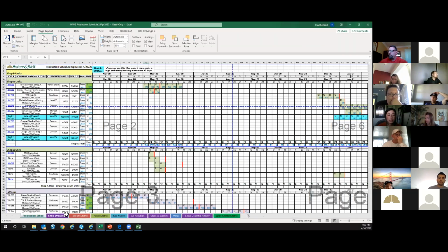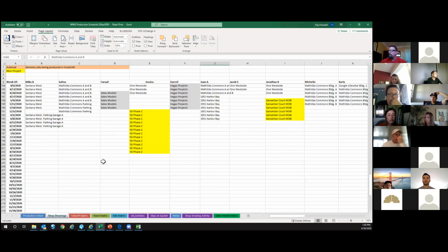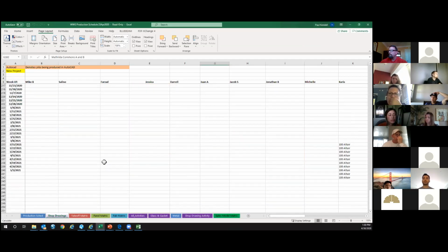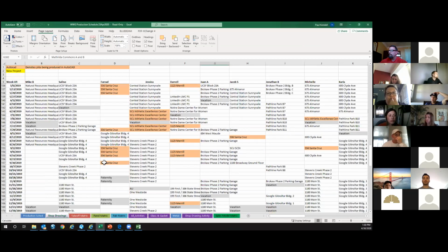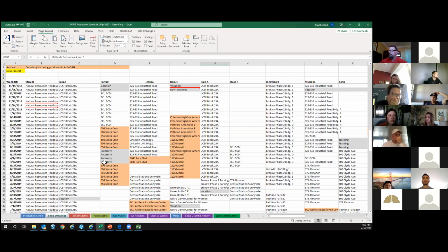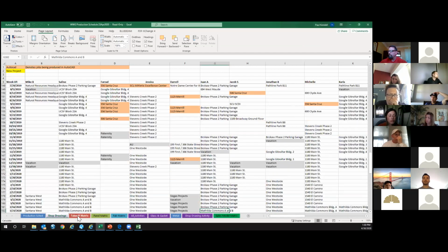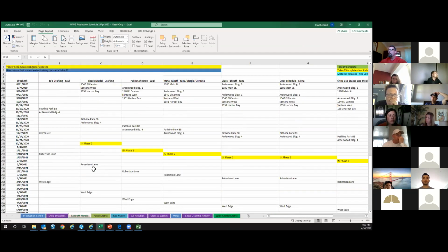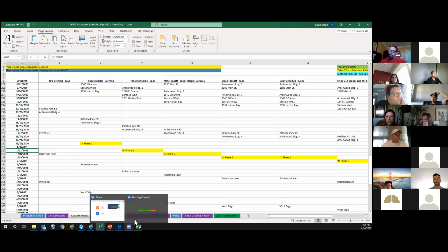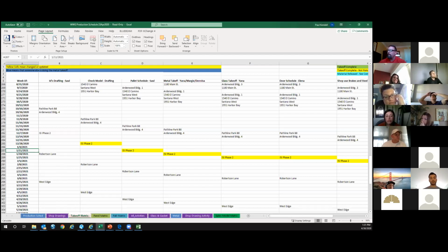So dates on my schedule that I was looking at aren't even in here. That's great. So if your schedule is ISI phase 2, these dates in here, this 12/8 should be 12/8 on your schedule. Pallet schedule should be 1/11. Just make sure that when you export your schedule into the portal, before you do that, all of these dates correlate to this master schedule.